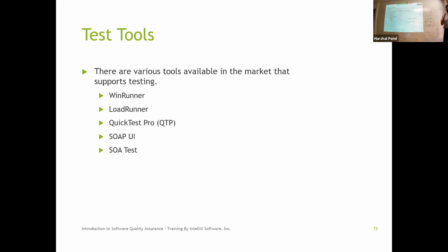Because one of the things, Dimple, you probably missed when you gave your estimate is, remember all of those test cases, you should have a script. They need to be repeatable and predictable, right? So you can't just say, hey, I'm going to do testing. You have to write step-by-step instructions. So writing instructions is going to be closely correlated to how many test cases you need to write.